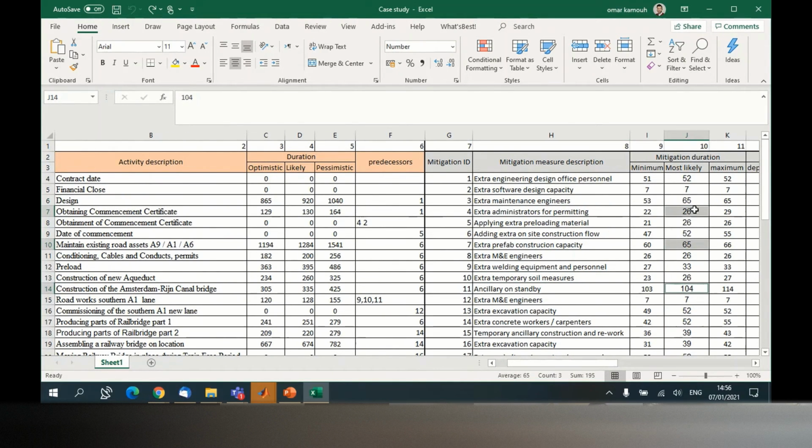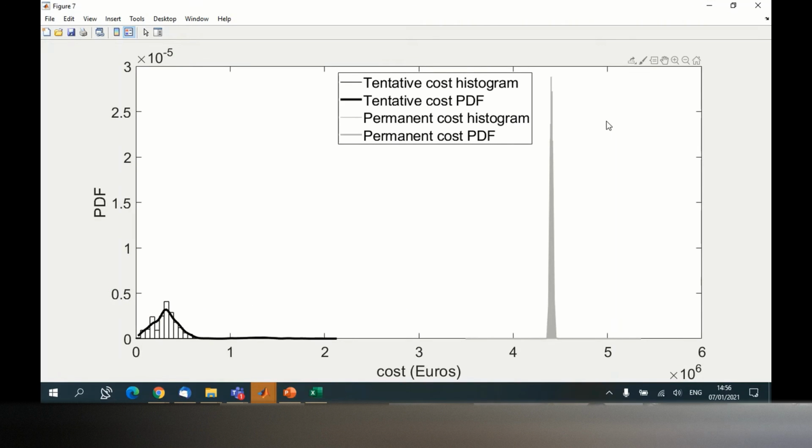It will save this cost for this iteration, then do another iteration and get another cost, and at the end it will give you a distribution of the cost for all iterations. So in one iteration it cost me this much, in another it cost me this much, and so on. And you draw this distribution.